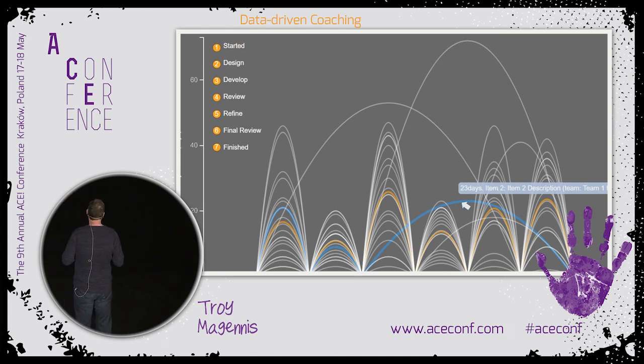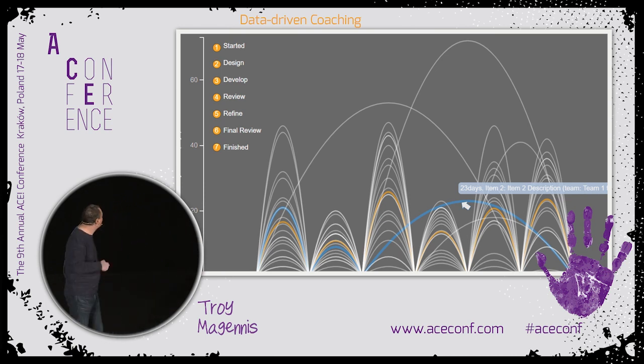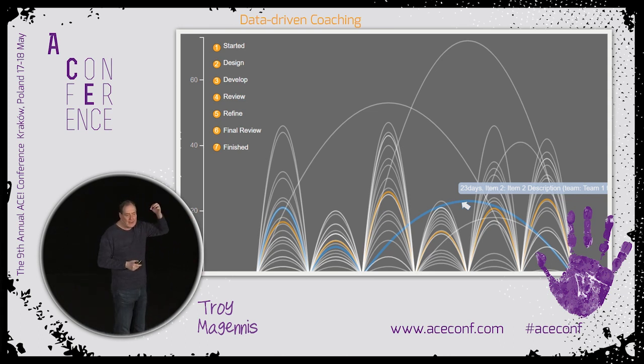The orange line is the average for each state, so we can see which ones are above average and under average. And this one was over average, under average. Now, when we just measure cycle time at the end, we lose that vivid story of how that piece of work is flowing through the system. And often it can be under, and then way over, like these ones. But we wouldn't know it yet because we just know that it's under the service level agreement or under the control line on a scatter plot. We don't know until it's too late that we need to do something about it.